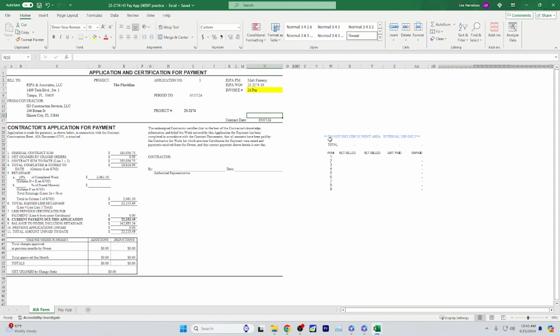The other thing that they have requested is that if we email to them by Thursday, we get in their clock where we are watched by their system to make sure we get paid within a week. And we're the only company that I'm aware of that gets paid within a week of invoicing, and sometimes it's 2 weeks, and I plan for at least 2 weeks, but usually we get paid if we submit on a Thursday. We get a check the next Thursday afternoon. It's available, and I usually pick it up on Fridays. So that is